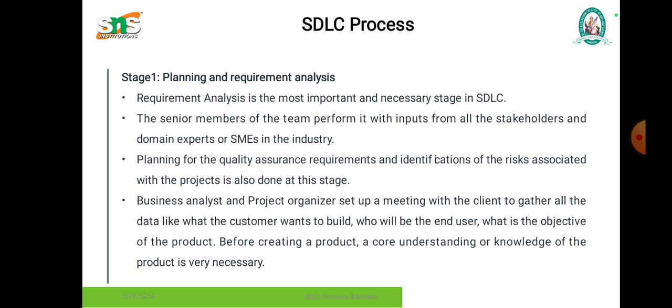The first step is planning and requirement analysis. The requirement analysis is the most important and necessary stage in SDLC. The senior members of the team perform it with inputs from all the stakeholders and the domain experts or SMEs in the industry. The planning for quality assurance requirements and identification of the software risks associated with the project is also done at this stage.